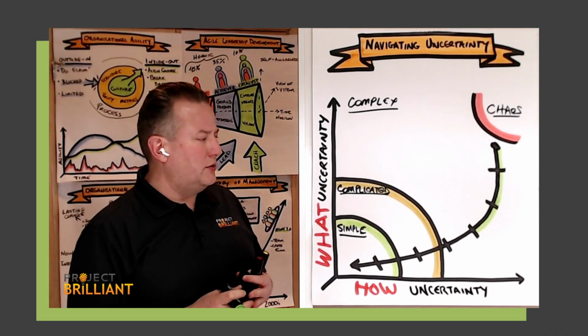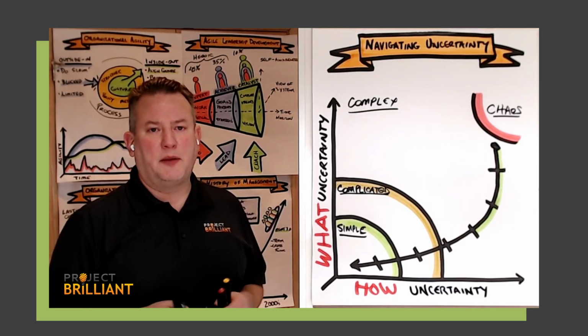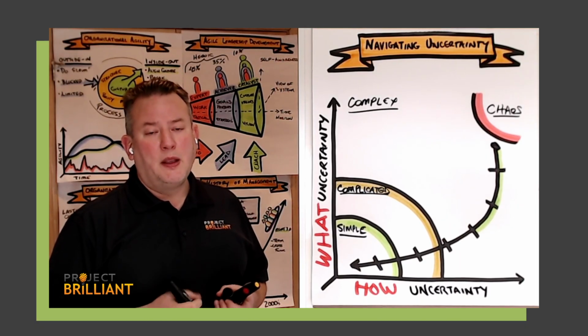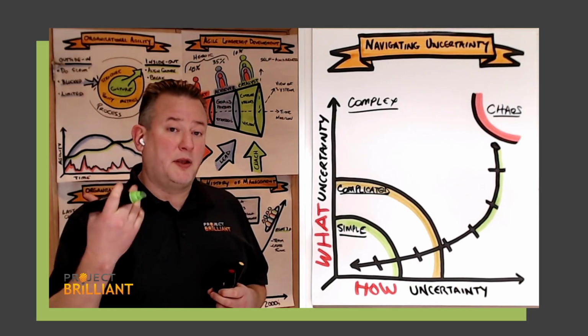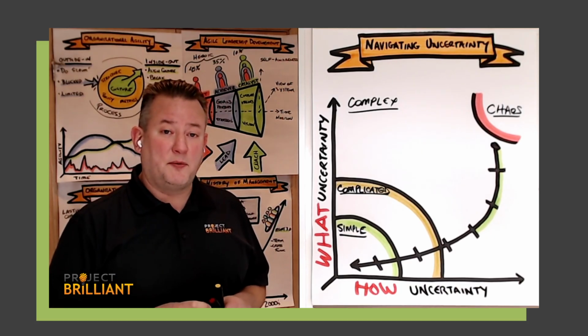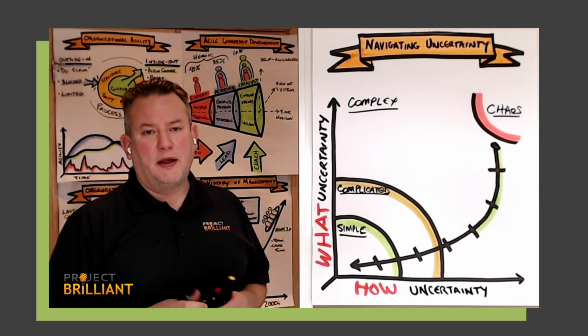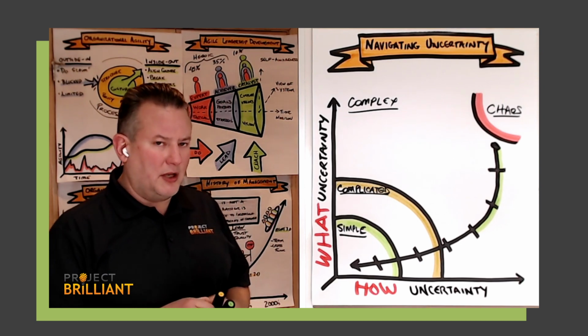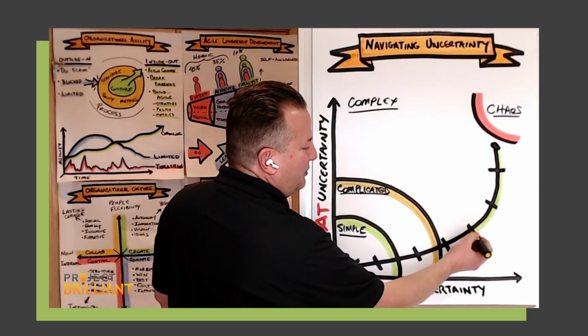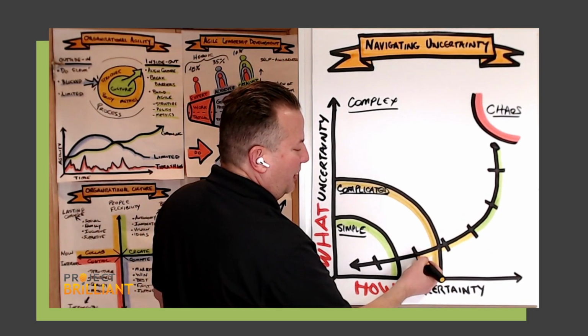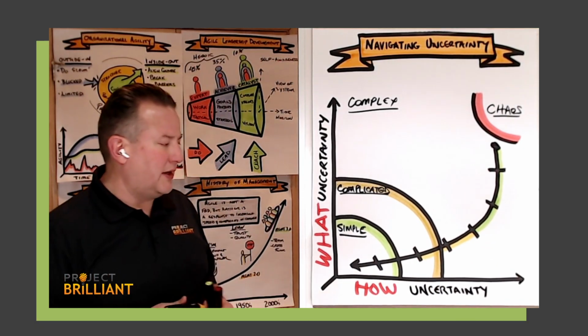And by the time we get to implementation and starting to build the thing, it might have been a while since we gathered requirements. Stakeholders might be discovering new things they think should be added to the product. And this is where oftentimes we start to turn yellow. It's yellow in that maybe there are other options we should be considering. Maybe things have changed. We want to start making change requests, stuff like that.